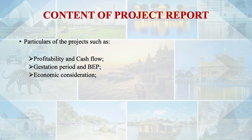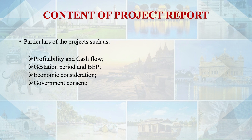Economic considerations include government consent, environmental consent, and any required licenses — for example, a bar operating within a hotel requires a specific license. A declaration from promoters confirming their commitment to finance and promote the project wherever required is also an essential component of the project report.